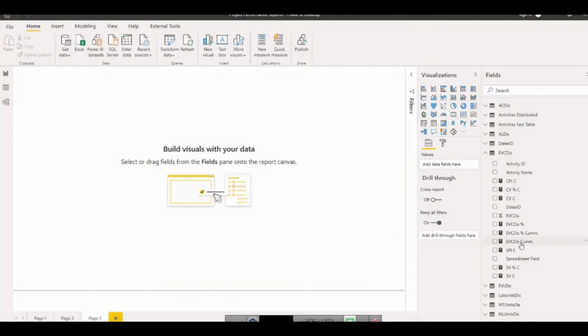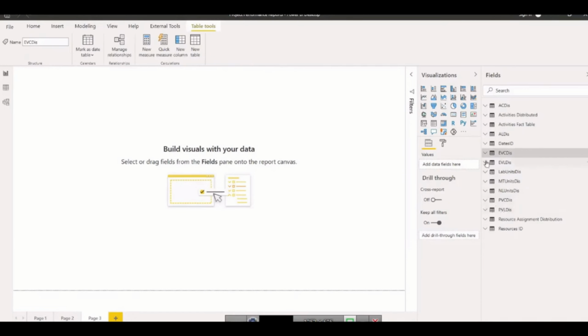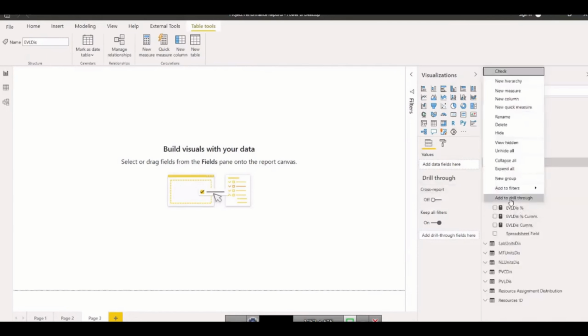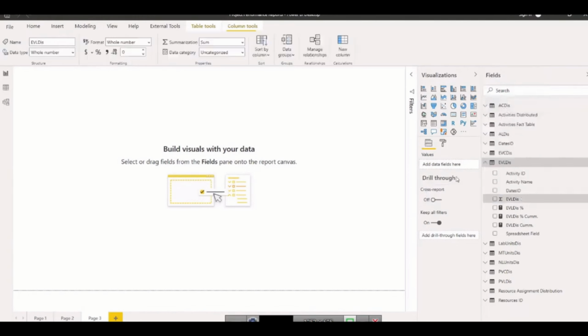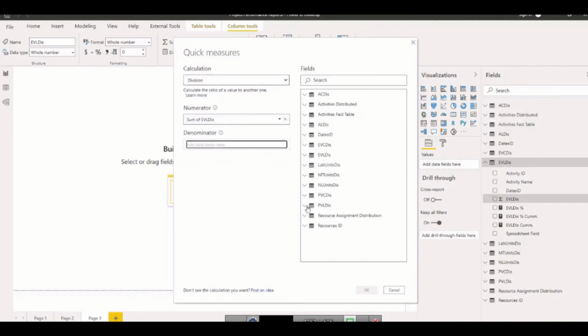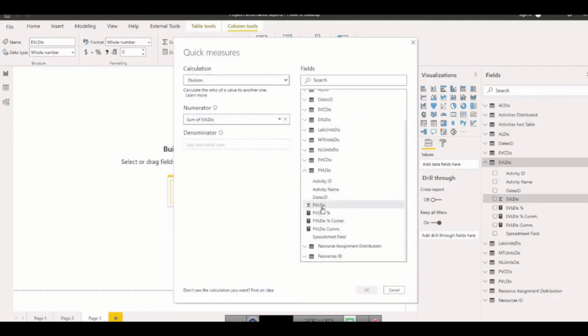So the same parameters I am going to make for the labor units, because there are few estimate at completion and estimate to complete remaining. We need to discuss that before. So before discussing them, I will go into the labor part and develop the same key performance indicators there. So first is the SPI of labor, which is earned value divided by planned value labor this time.